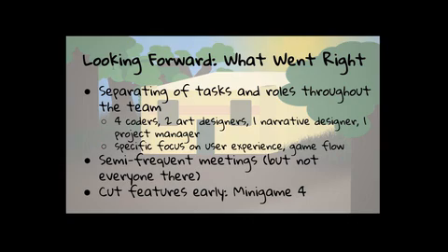Yeah, so as Rachel was saying, we separated a lot of the tasks of the project between the team members. And since we had 7 people, we designated 4 to coding, 2 to design and art, and then a few others to the other aspects such as narrative, project management, and sound. So that actually helped us a lot in that having only 4 coders rather than 7 really cut down the number of merge conflicts and issues that we had in previous projects, because obviously the fewer number of people working on each file, the less likely it's all going to break when people merge their stuff together in GitHub.